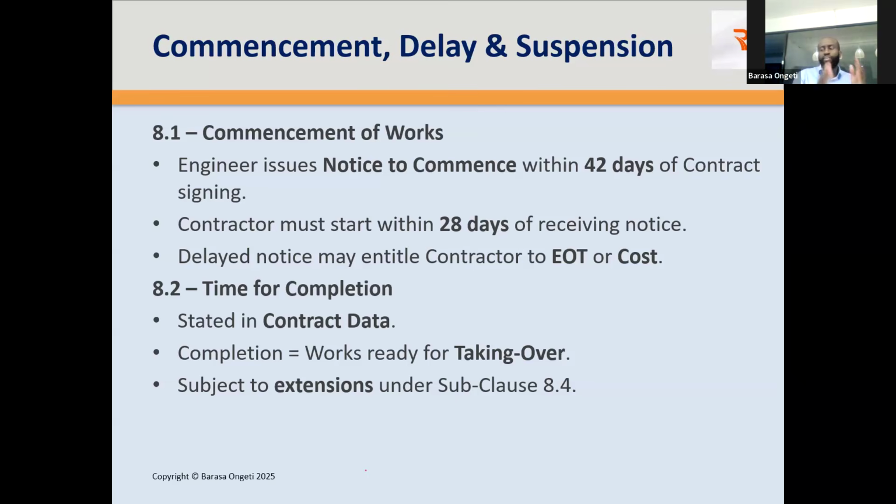The contract is not only general conditions or particular conditions. We also have what is called the contract data or appendix to contract, the drawings and the specifications and all these other documents. So the time for completion is not stated in the general conditions, but in the contract data. And completion, what do we mean by completion? Completion means the works are ready for taking over. Now, in the course of your careers, you will hear words like substantial complete or substantially complete, and so on and so forth. FIDIC does not define such terms, but we use them in industry a lot.